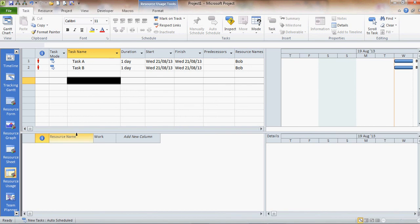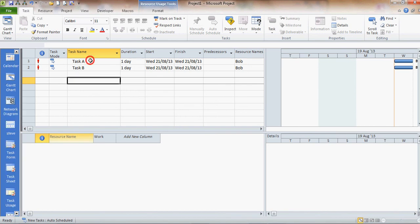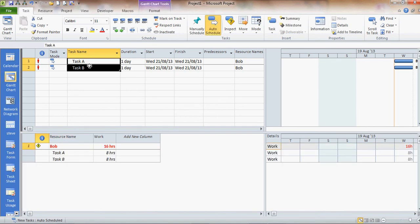Now there's nothing there at the moment but as soon as I highlight the two tasks at the top I can see Bob task A and task B 16 hours in red over allocated.